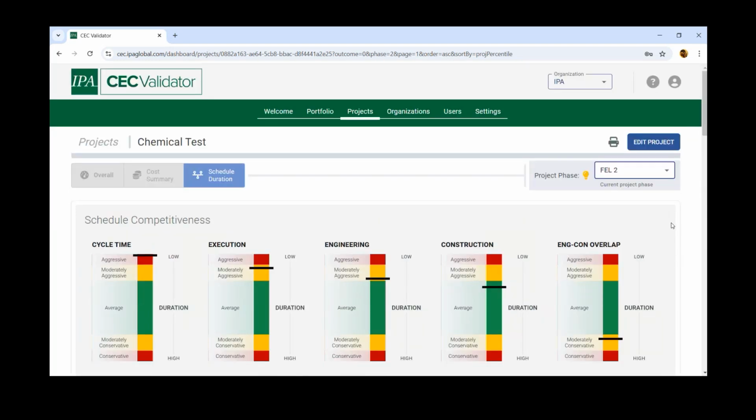It's not going to save all the versions if you do multiple versions within a given phase. It's going to save the latest version of any phase. So before you move on to the next phase, ideally it's good to make sure that that's the latest version you want to keep in the system before you move on to the next page, because that report will stay saved.